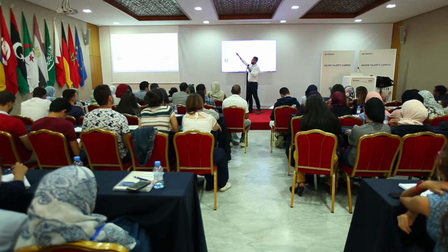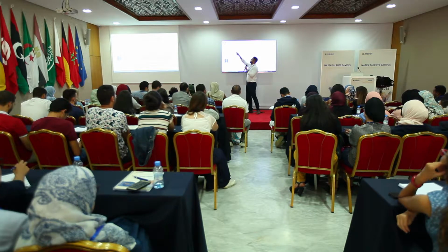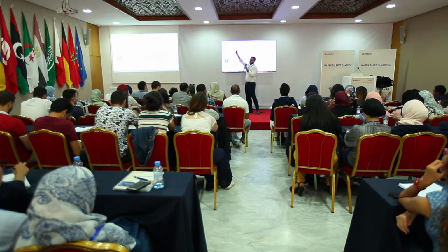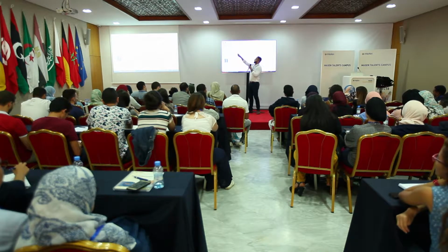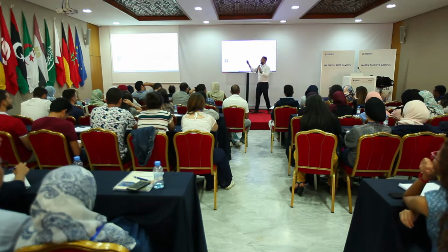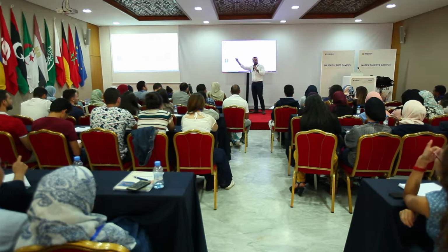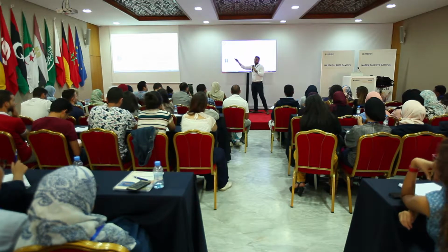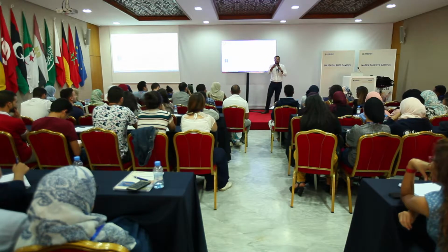If you look at the steps after financing, once you say, yes, we have the 600 million, let's go ahead, construction begins. Construction is led by the engineering firm, the one that is constructing, right? Together with the developer and the tech owner, because they usually launch tenders to get the supply of equipment. So they launch a tender for the tanks, a tender for the heat exchanger, etc. Different companies that produce this equipment come and win a tender with them.